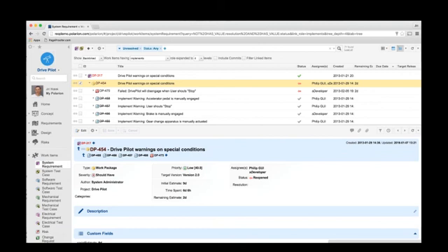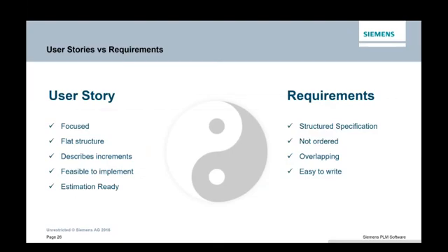Here on the screen you can see the work package that really defines an activity to deliver some of the requirements for a specific version. In the example I mentioned, I have two versions A and B running in parallel, and there is one requirement that should be applied to both versions. I will have two work packages if these are two different teams, for example, one to implement the requirement in version A and the other to implement it in version B. And of course the work package could relate to multiple requirements. One of the typical implementations of a work package is the Agile user story concept.